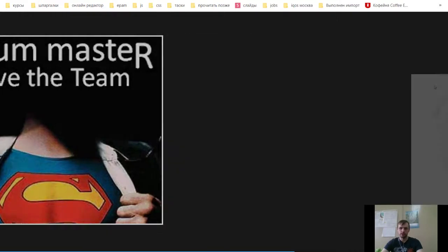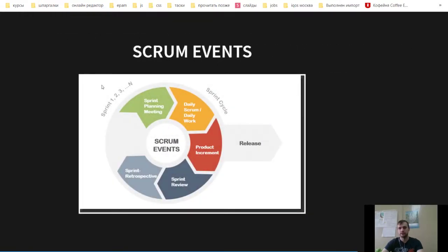The Scrum framework is marked by 5 events. These are the sprint, sprint planning, daily Scrum, sprint review, and sprint retrospective. Sprint, iterative time boxes where a goal is accomplished. The time frame doesn't exceed 1 calendar month and is consistent throughout the development process.